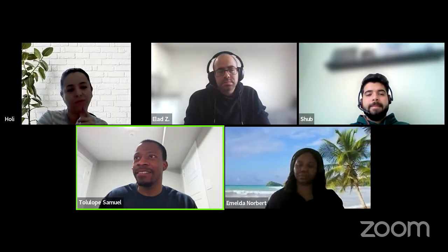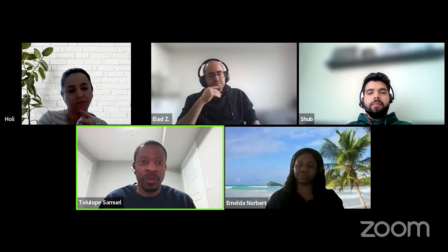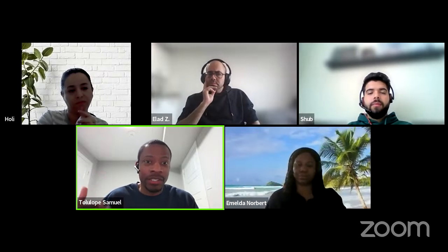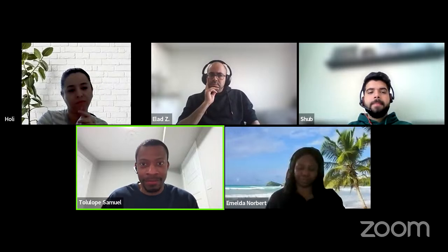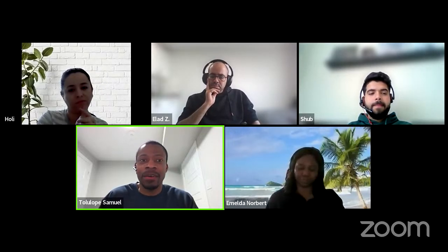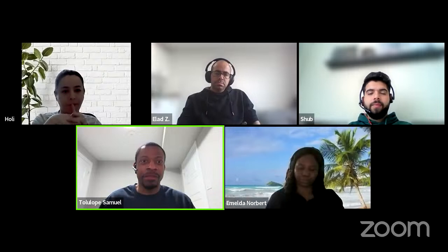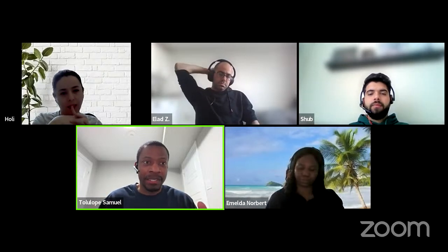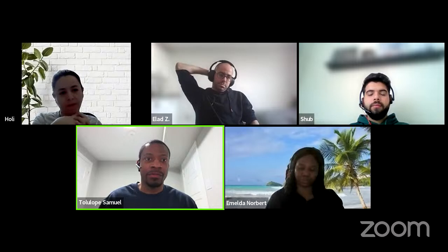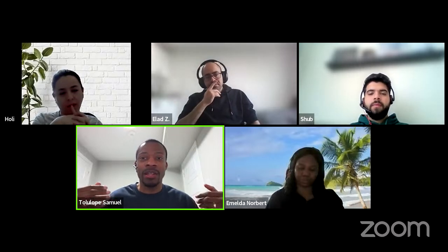Okay, makes sense. That's beautiful. So essentially, you'll be setting up a recurring meeting with everyone, maybe once a week or twice a week to start, and then as everything becomes much clearer, you meet less frequently. Good. You want to set up a cadence with your team to meet frequently, so you can update each other and track progress.